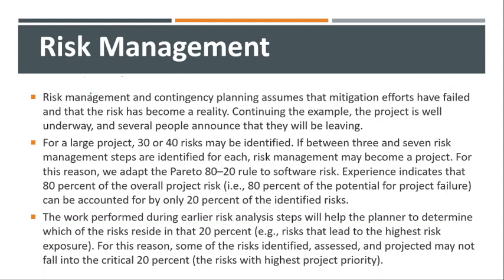Let's see the last point: the work performed during the earlier risk analysis steps will help the planner to determine which of the risks reside in that 20%, for example, risks that lead to the highest risk exposure. For this reason, some of the risks identified, assessed, and projected may not fall into the critical 20%, the risks with highest project priority.